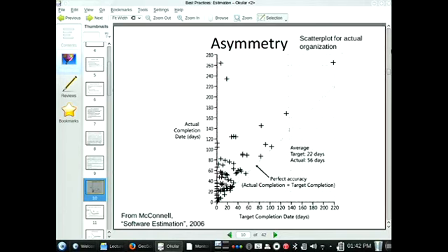but there are also some other matters here. What could lead something that you think will take 2 weeks to take 4 months? By the way, I've seen this before in projects. I've lived through projects like that. Okay, so yes, you're assuming that you have access to the Oracle server immediately, but it turns out that you have to go through a long approval process, and you actually don't have access to that resource immediately. So certain processes are not in place, certain resources are not in place.